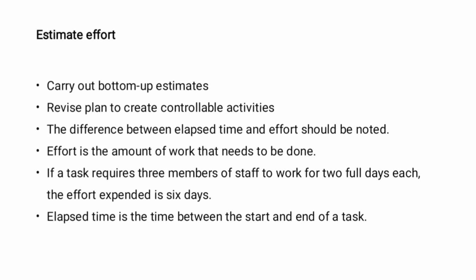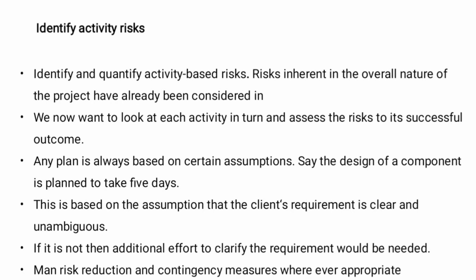Then the next one is estimate effort. It carries out bottom-up estimates. It revises the plan to create controllable activities. Then the difference between the elapsed time and the effort should be noted. Effort is the amount of work that needs to be done. If a task requires 3 members of staff to work for 2 full days each, the effort expended is 6 days. Elapsed time is the time between the start and the end of the task.